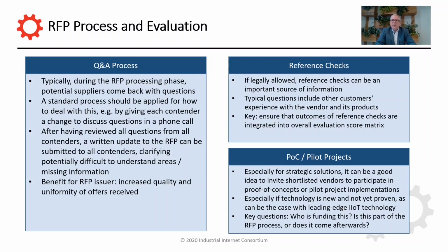One key question here is, who is funding this? Is this part of the RFP process? Do you expect the top 3 vendors to basically do this for free? Or is this already part of the project execution phase where some funding from you goes into this? Again, that's something that should be clearly articulated in the early stages of the RFP process.